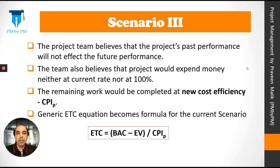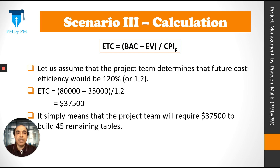Scenario 3: the project team believes past performance will not affect future performance, and the project will spend money neither at the current rate nor at 100% — something different. The remaining work would be completed at a new cost efficiency. For example, if the team has learned from the past and determines that future cost efficiency can be improved to 120%, or 1.2, then putting 1.2 in the formula gives ETC equals $37,500 — meaning the team will require $37,500 to build the remaining 45 tables.